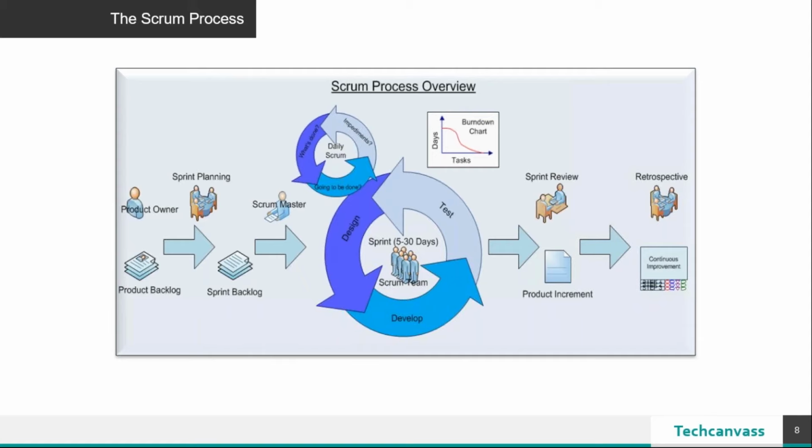The sprint review or the sprint demo happens on the last day of the sprint. So the day when your sprint ends, you usually have this sprint review, wherein you demonstrate the stories to your stakeholders and the product owners. And if that is accepted, it is tagged for the release. And the team themselves can have a retrospective meeting.